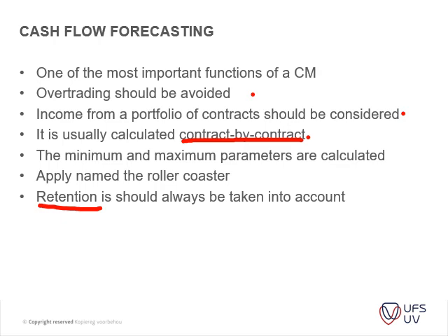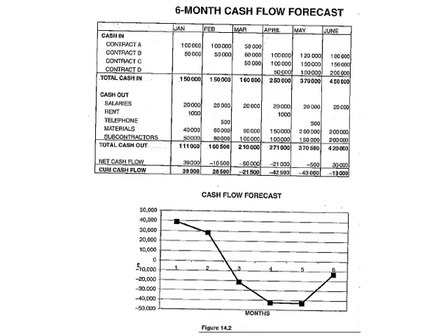So most of the contractors try and price their P's and G's in such a way that that 10% is actually the profit that they get after the year or year's retention. You should also consider having a retention on your subcontractors as well, to lessen the load on your cash flow.